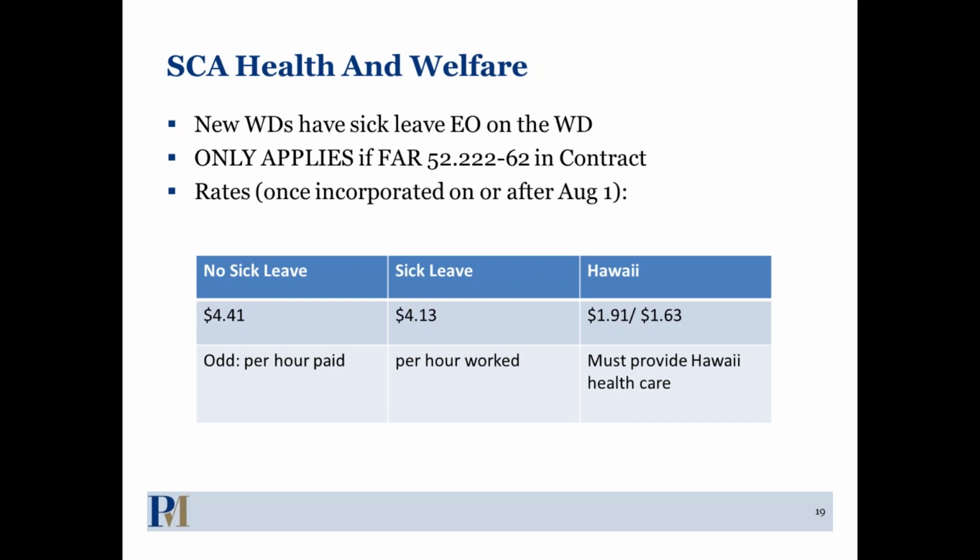Can a contracting officer include the sick leave in a modification? Yes, but it would be pursuant to the changes clause. It would be a change. Your contract would be modified to include the FAR provision, not the new wage determination, the FAR provision. And then you would say, okay, well, it's a change to our contract, and we should be eligible for all of the costs that are associated with a change in our contract. We wouldn't be limited to the same things we're limited to in the price adjustments clause.